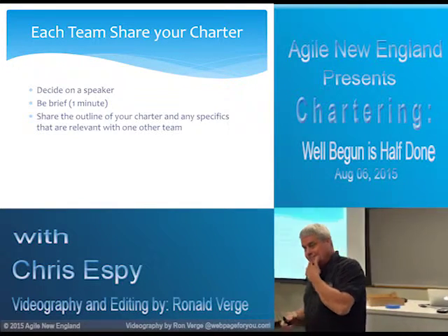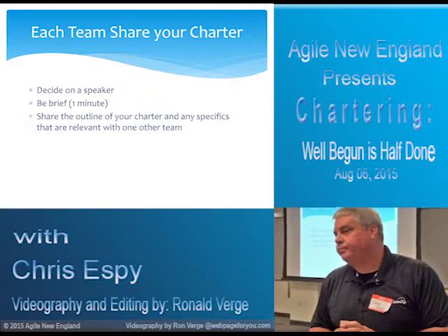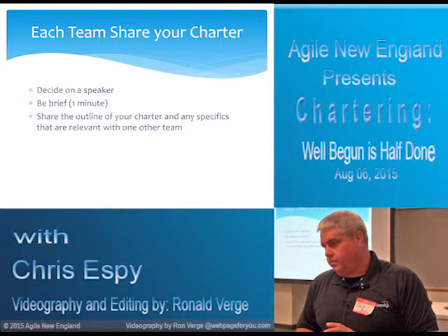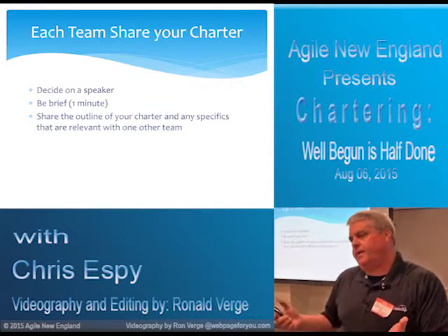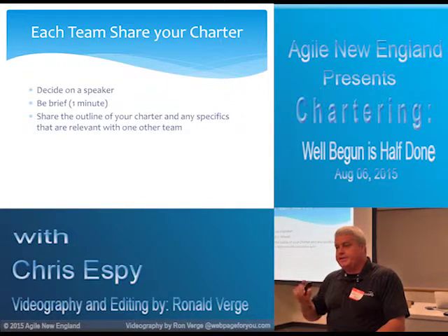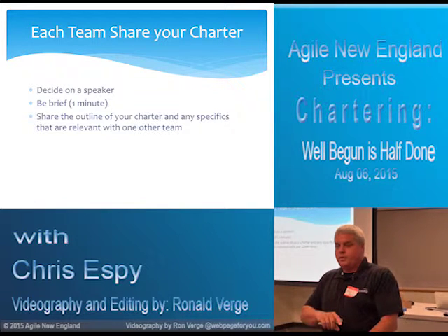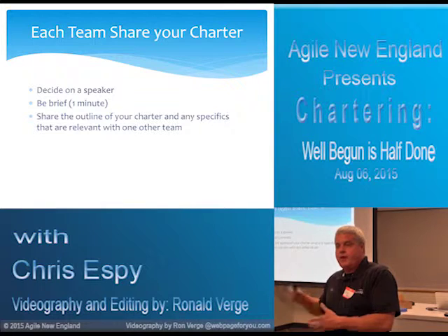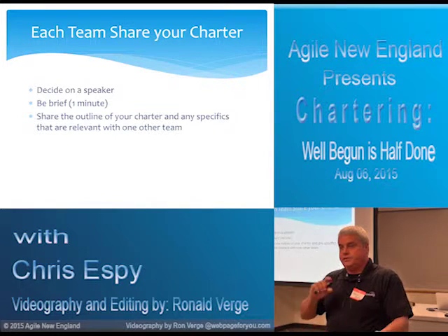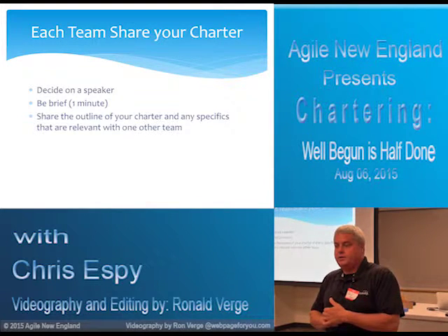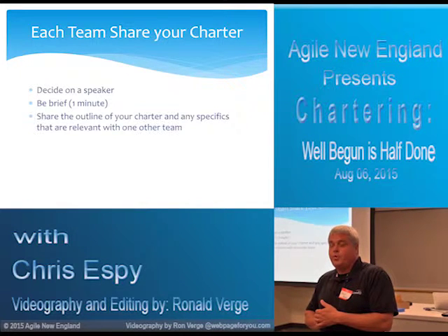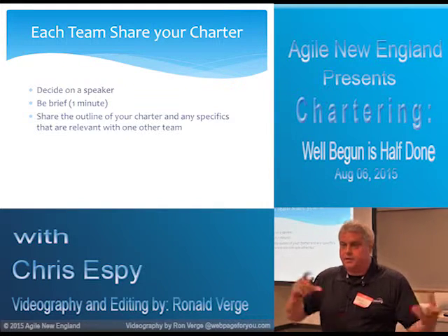Two questions. One is, how long do you see that initial chartering taking? How long is that period that you do that over? I would say 8 hours, but I wouldn't do it all in one session. I would do at least 2 sessions: 4 hours to get all the way down to the vision, and then take the other 4 hours and talk about mission and working agreements. I usually do it over 2 days, 4 hours per day, or even 3 in shorter periods of time.